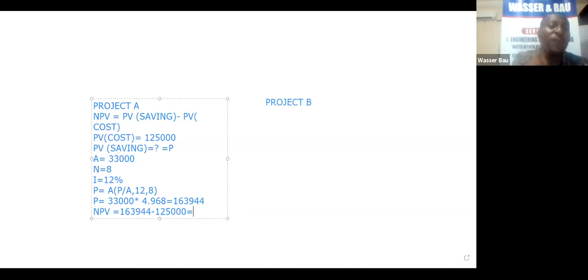Some company, if they do a contract and make 5% profit, that 5% will not be able to pay for their rent and their tax. And that's why some engineering companies, after a few years, fold up, because we're not able to capture the worth of our overhead in a year. So if somebody is giving us a job that will take our staff for 1 year, you should make sure that those investments will take care of the salary of those staff, take care of fueling your vehicle and partying and every other thing. That's by the way.